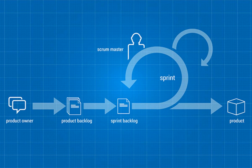We size everything, convert it to hours and dollars, and customers can then go through and exclude stories or features to size the product backlog to their budget. We work with them to determine what's most important and where they'll get the most value for their investment. That's when we establish the baseline — what user stories are must-have for this release, sized in story points and converted to hours, dollars, and a schedule.